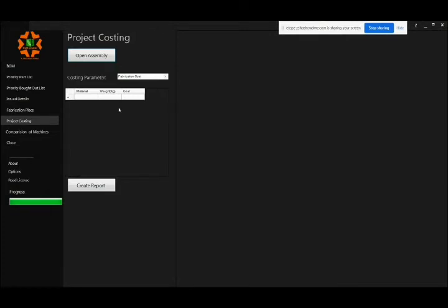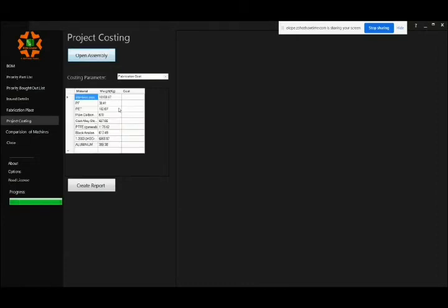Next is say stainless steel SS304. I say 350 rupees a kilo. So that again includes the material, labor, pickling, passivation, welding, bending, everything. So operation cost, everything. That's a lump sum cost to my company, right? So that gives me a finished weight cost of my machine. Next is the engineering cost.